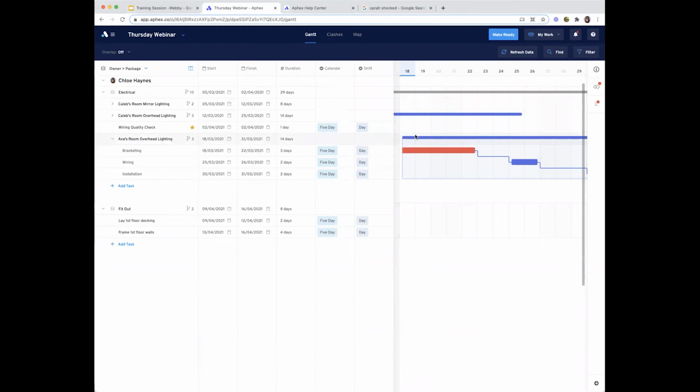Calendar and shift are quite important. So for calendars, these can be imported or configured in-app. You also have a selection of basic calendars to pick from. So I can pick from my 5-day, 6-day, 7-day, etc. Maybe my company has a specific away day at the end of June, so I could customize the 5-day calendar to reflect that.